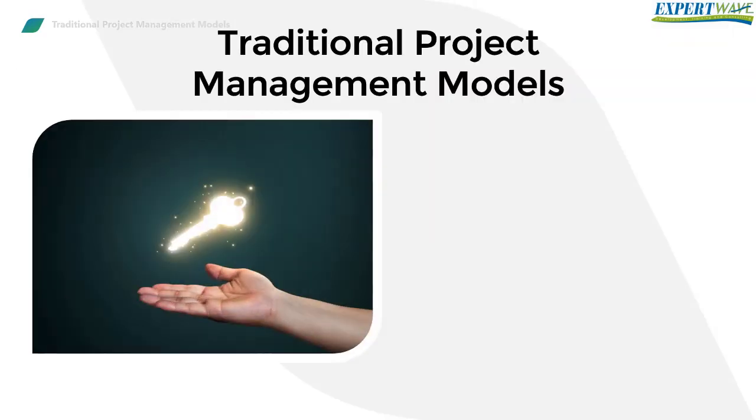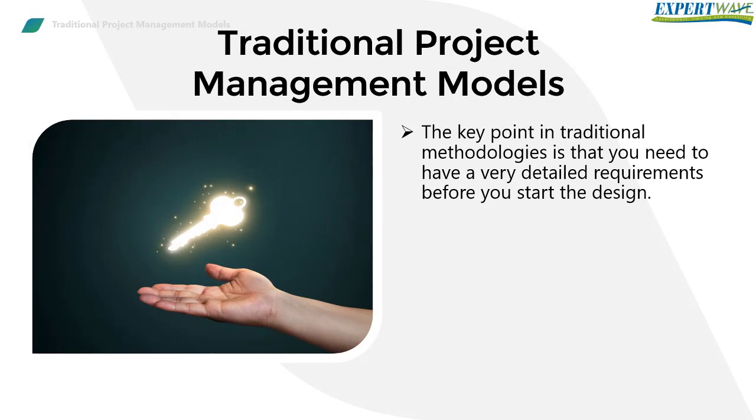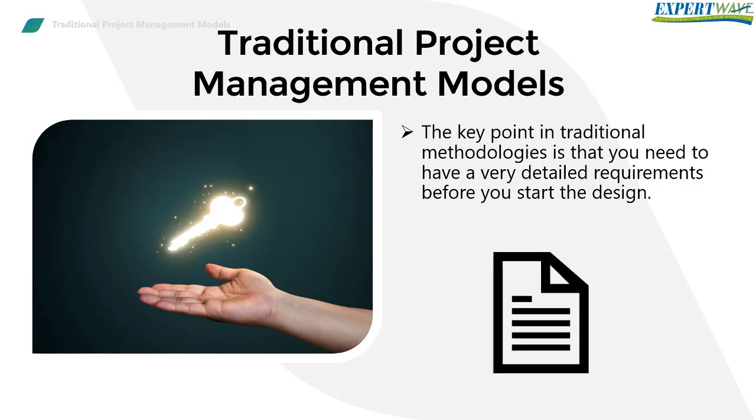And now, please pay attention. The key point in traditional methodologies is that you need to have very, very detailed requirements before you start the design. Imagine now if your software is to print an invoice. Then the requirements from day one would be to indicate the size of the paper, table size, table header, font size, font color, logo size and position, header, footer, and so on. And the customer would have to sign off on that. And if the customer ever had to change his mind, well, he will pay for it. He will pay for every single change in the project.